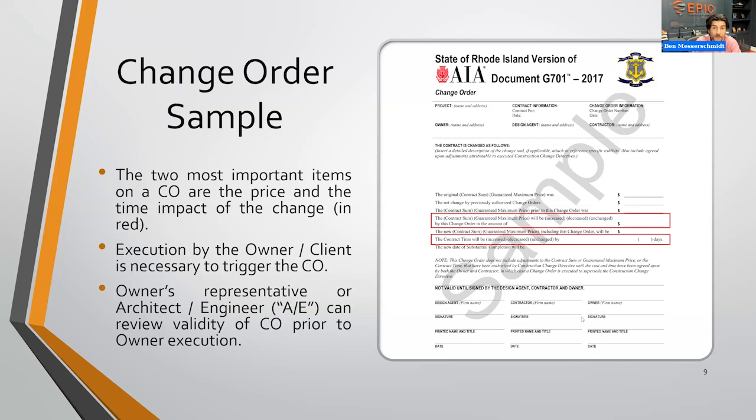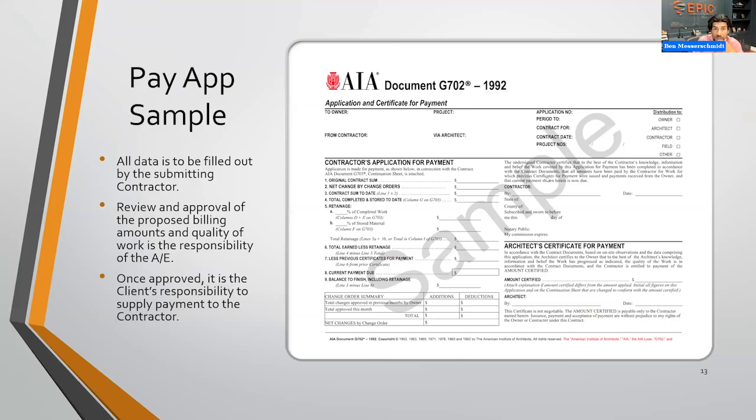go ahead and proceed. One thing here is if the contractor moves forward preemptively without the owner actually signing this, they are driving a car without their seatbelt. The association or the owner is under no obligation to pay for that service at that point in time, especially if they were outside the loop. Why should they? So having proper paperwork every step of the way is going to be critical for a successful project. Let's get back to the pay app.